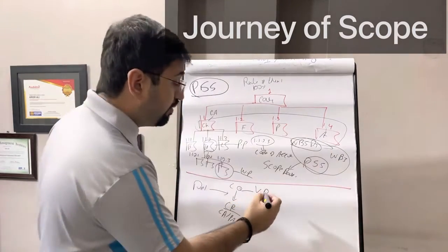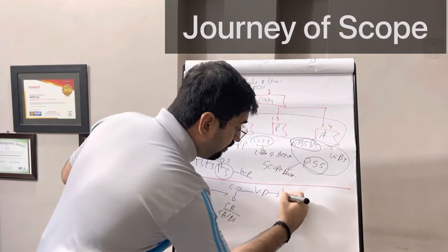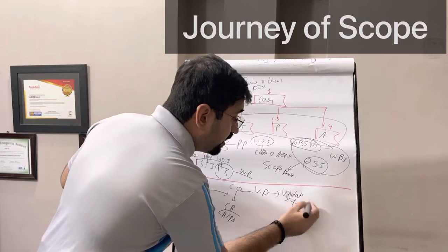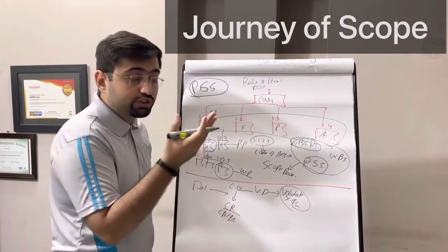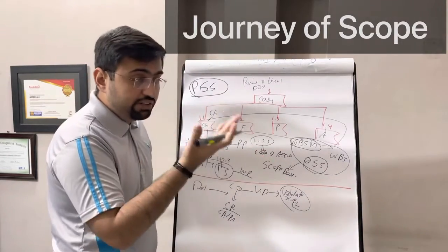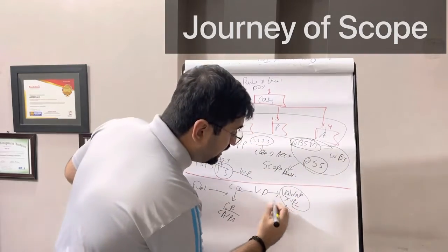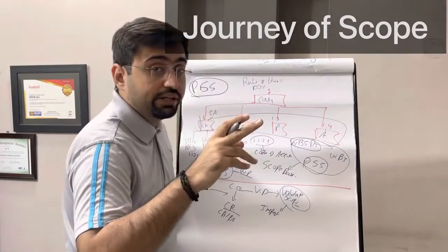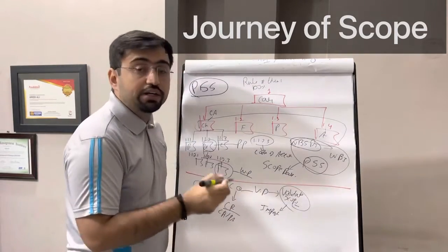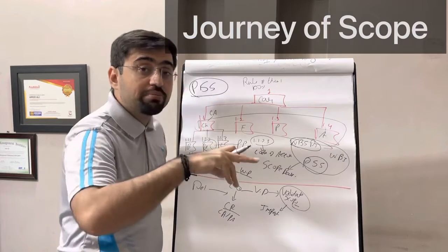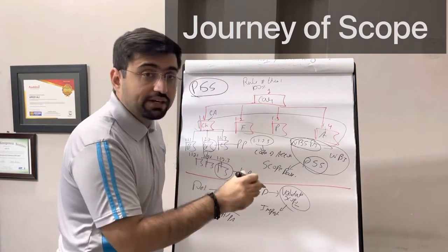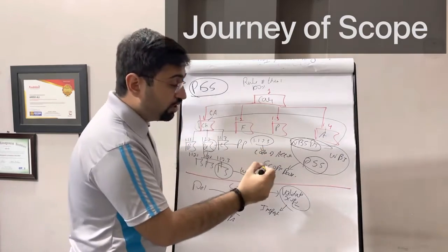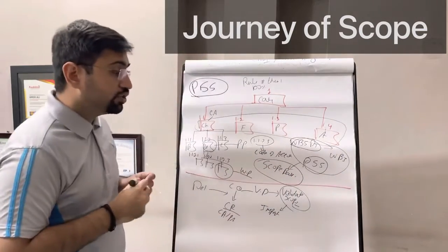If the verified deliverables come into scope, we have a process, validate scope. It is a process where, with the client, we show the deliverable. The client will check and inspect the deliverable, and verify it according to the scope baseline. Now in quality, we were checking the deliverable against the quality management plan. In scope with the client, we are going to check deliverables according to the approved scope baseline. So remember this thing.